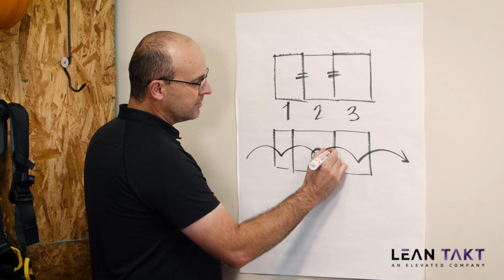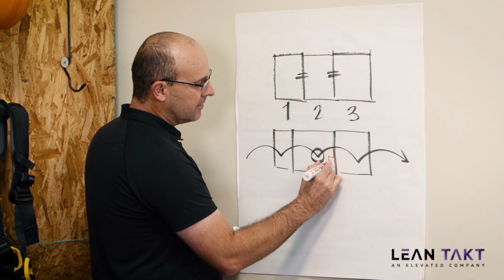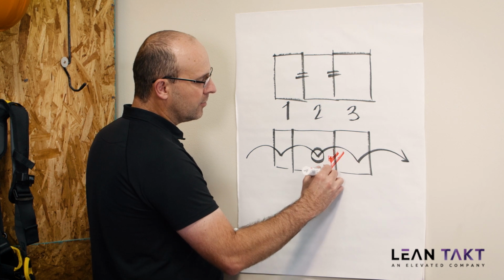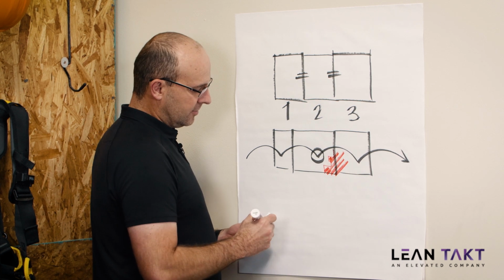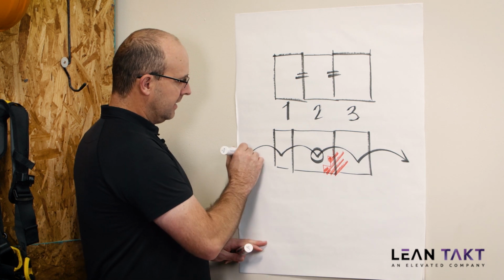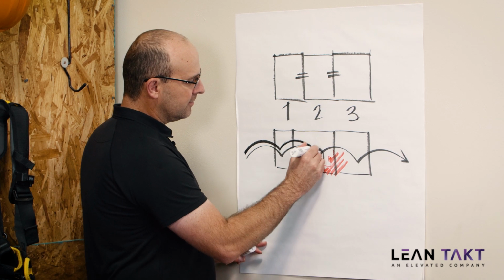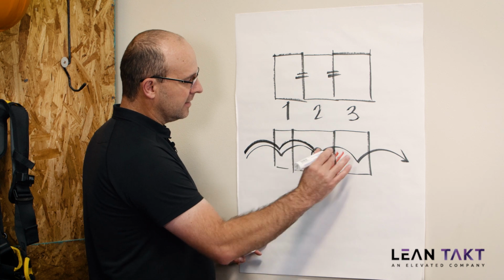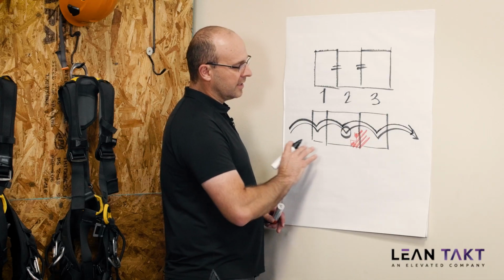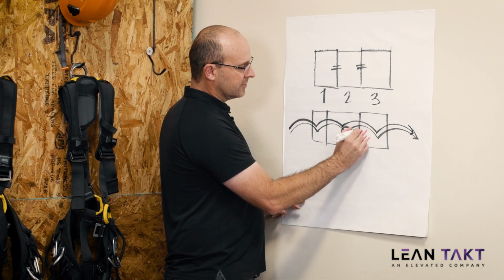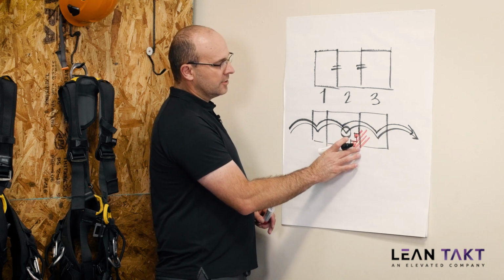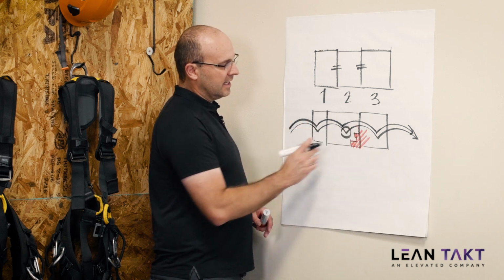You may want to adjust the boundary of that zone and pick up a little bit more work inside this zone, so that when they do come in here the second time, similar amount of work, ooh, that's nice, that's not like a bottleneck anymore, similar amount of work, and they can flow beautifully through there. So all we did was adjust the takt zone boundary for us to have optimal flow.